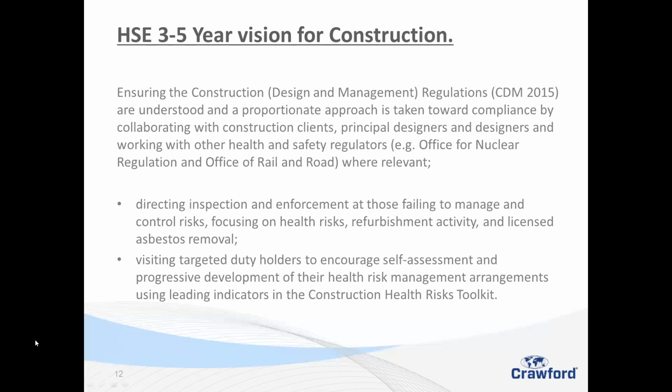In our cases with refurbs, etc., we usually get confirmation in writing from the policyholder that the contractors can use the facilities, whether it's just the resting and keeping dry facilities, or the bathroom as well. And if the bathroom isn't allowed, most of the time we go and put a portaloo outside. It's a case of mix and matching sometimes to meet the regs, but definitely it is the duty of all, really, to make sure the regs are met, and that includes welfare.